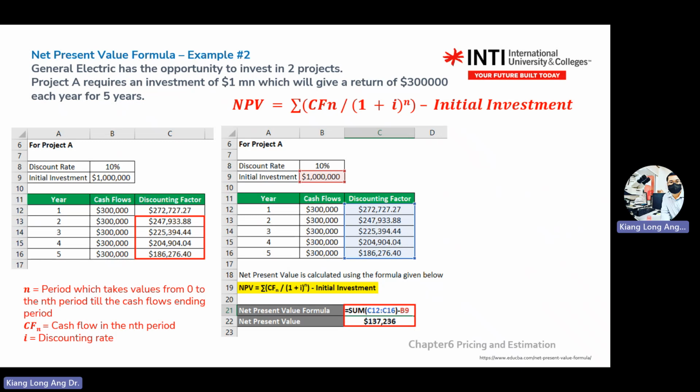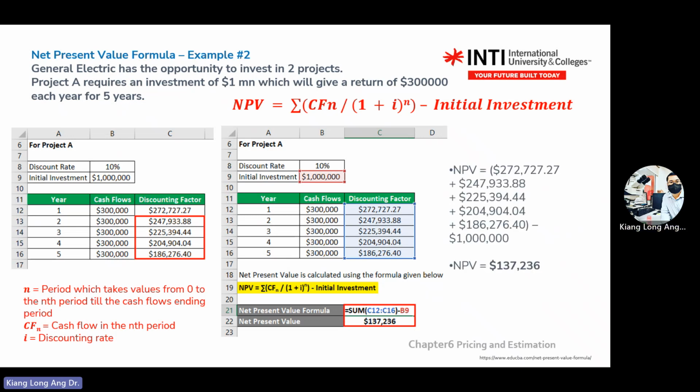The important thing is that you're able to look at the number and then ask yourself, so what, right? You need to make a decision whether you can accept or not accept. You have to write the statements, right? NPV more than zero, you can write a very short statement: NPV more than zero, accept this project, or which one is better. Less than zero, do not accept these projects, something like that. You make that statement.